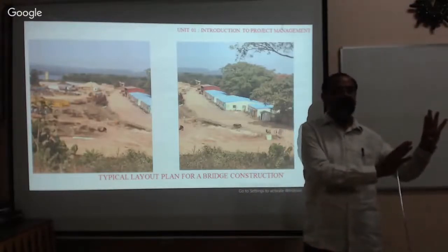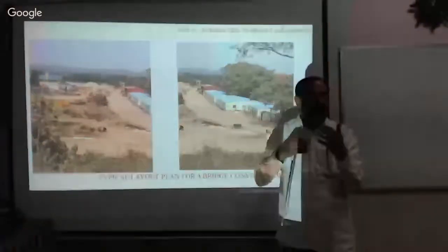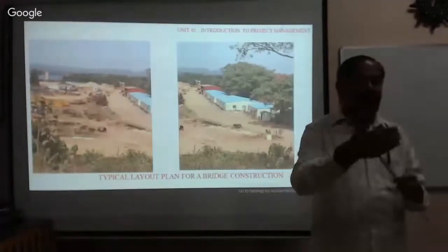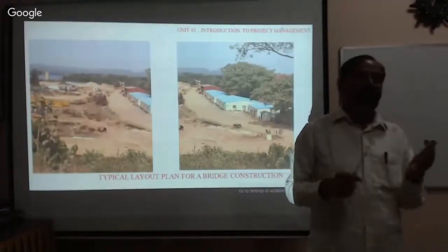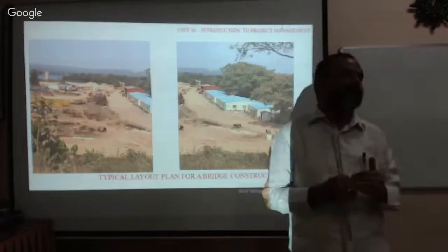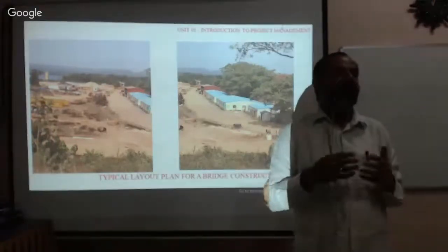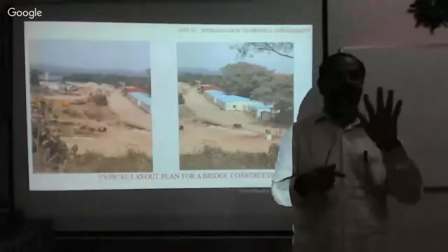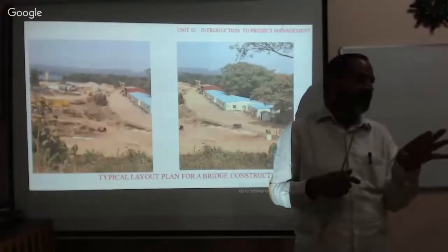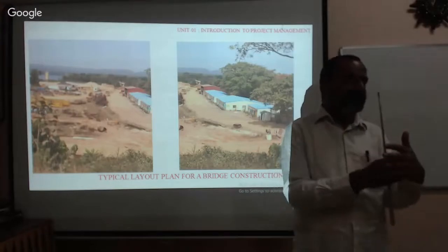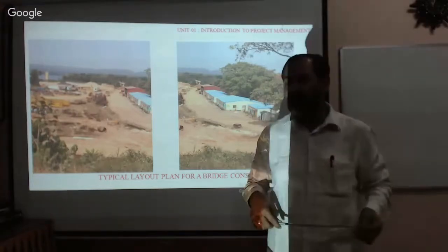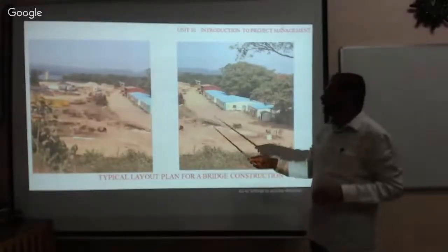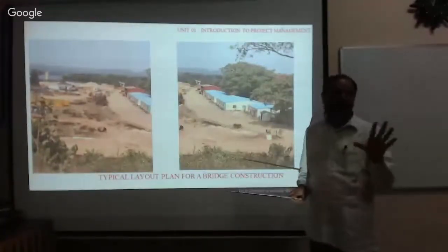The transportation and traveling time reduces, and wastage is minimized. Then you will get an efficient project. You are also maintaining the concrete standards, such as setting time. Therefore, we need to plan the job layout carefully.